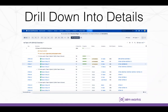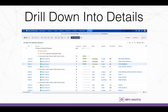When you do sprint planning and break down features, if you update the story point count, the WSJF weight, or add more dependencies, this new information updates and shows in both places. Structure is a great way to look at all this information — you can add and remove columns to show exactly what you want, no more, no less. It also offers inline editing: you can add a column for story points, status, and define how progress is tracked. Progress can be tied to status or other fields. Structure is not prescriptive, so you can bend the tool to the way you do work.